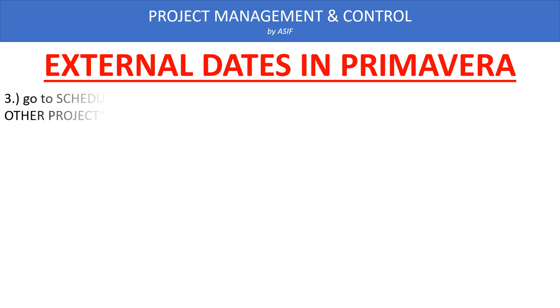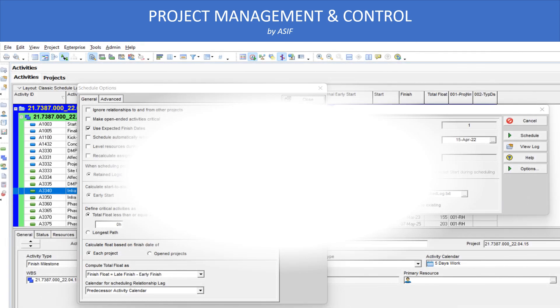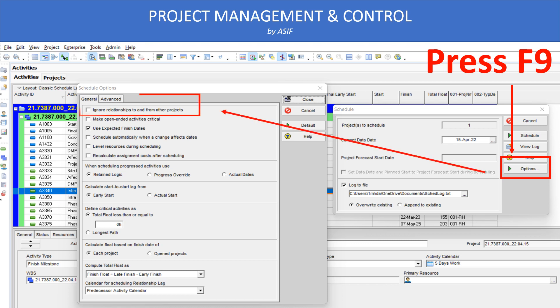In addition to this, we have to protect our program from external dates. You have to go to the Schedule option and press Options. In the Options dialog, there is a General tab. In the General tab, you have to click the option 'Ignore relationships to and from other projects,' as explained in the diagram here. When we press F9, the schedule dialog box will open and we click the Options button, which opens the Options tab where we select the General tab and click that setting.